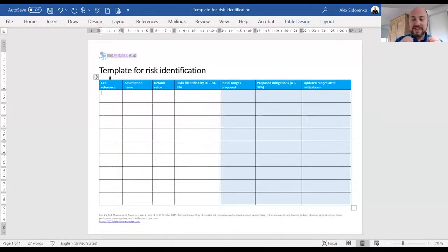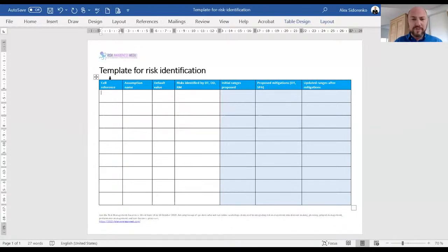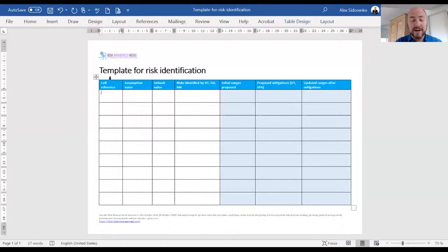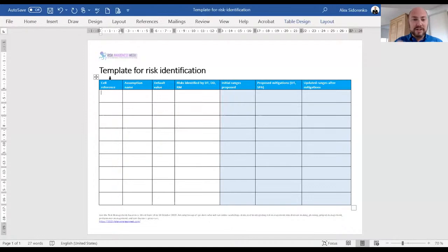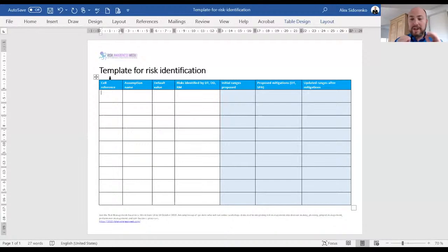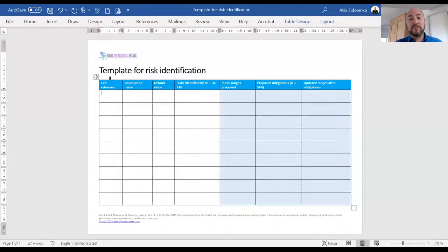Risk identification starts not with the checklist, not with your categories of risk, not with strategic operational financial and reporting or some other nonsense that international best practice guidance came up with. Risk identification starts with identifying all the assumptions that are relevant to a particular decision. Before you can even begin to think about risk identification, you have to understand the decision at hand, break down that decision, and find the model.